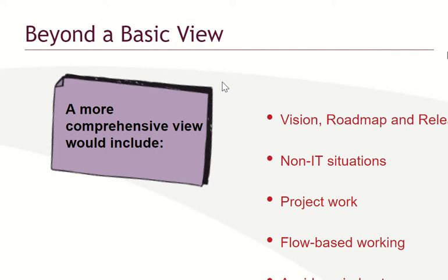It also depends on the size of the land, you know. If the land is acres, hectares, doing the fence around may be very expensive. It may be better to start building from one end, doing the foundation of two plots out of, you know, 10 acres, than to do the fence around the 10 acres. It all depends. But the first one you do is the minimum viable product, the one you start with. And it's also a shippable product as well. All right. Can we continue?